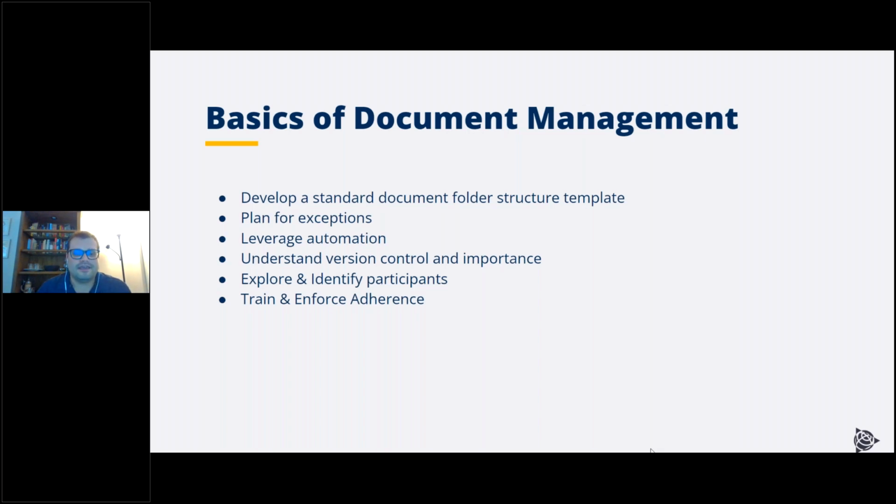Another pain. Going back to a claims example, we're having a claim against us. Not having the right version of a file can be extremely costly. I know of a customer that had the wrong version of the file when fighting a claim, and they lost. Even though they were right, they lost by presenting that wrong version. Knowing which version is the latest is extremely critical. eBuilder has a built-in versioning tool, so it can help you know which is the latest version and take out the guesswork.